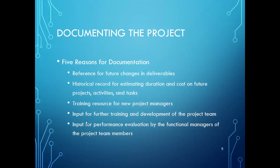Why is it important to document a project? There are many reasons to consider. We can mention the top five. First, documentation can be used as a reference for future changes in deliverables and for similar project goals. Second, it can be used as a historical record for estimating duration and cost on future projects. Third, it can be used as training material or to develop training material for new project managers. Fourth, it can be used as input for further training and development of the project team. Fifth, it can be used as input for performance evaluation by functional managers of project team members.